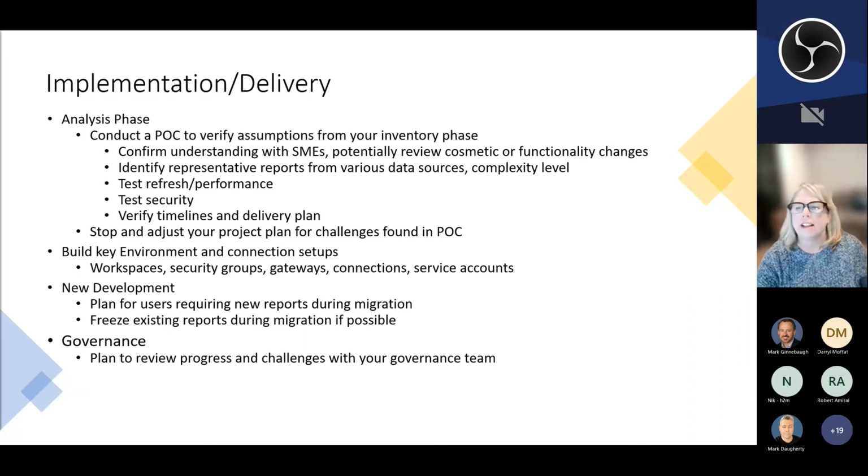So ideally, you're not 6 months in before you get here, right? You're maybe spending 6 weeks doing some of this inventory. You're setting up the project plan, and somewhere in this time, you've built in at least 2-3 weeks or so to do this POC, so that you're going to be able to find what's going to be challenging and plan for it, and not have it be a surprise to the people who are like, hey, we're going to cut those licenses off, right? And you say, well, no, hold on. We've got to do X, Y, and Z before we can make sure this is going to be successful.